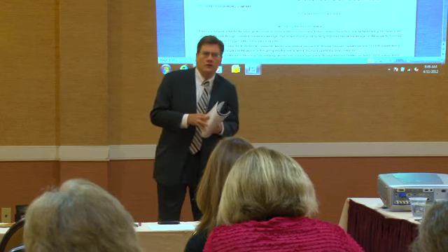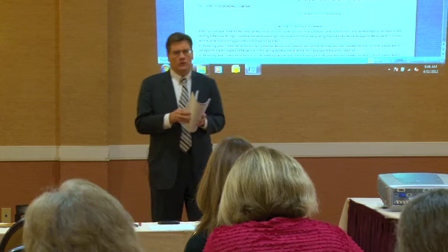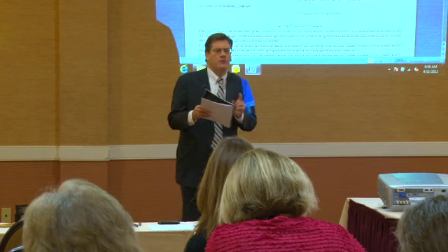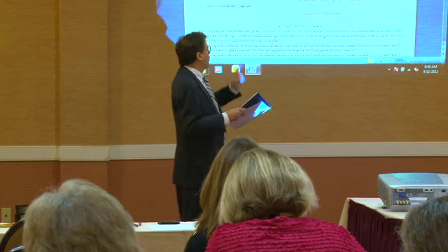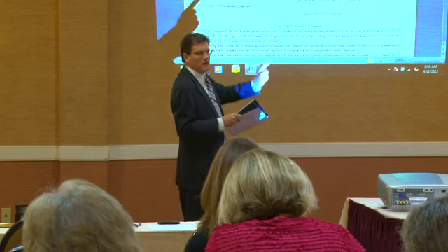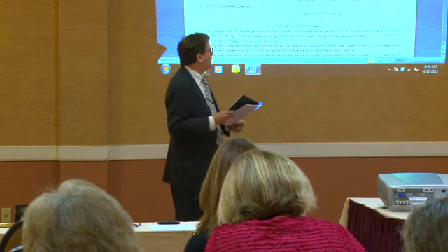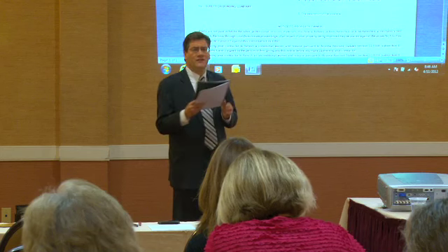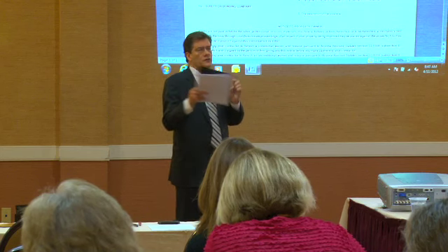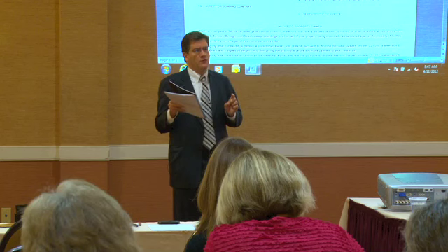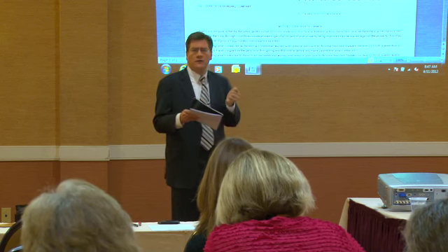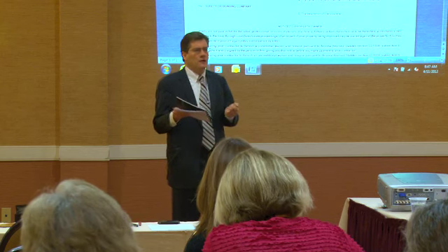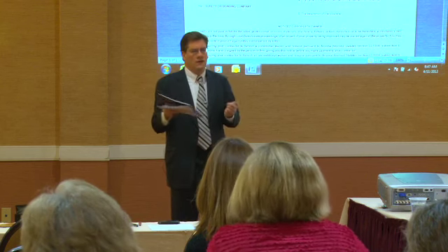The other thing is, in Arizona, we have a 120% rule. Now, that 120% rule says that you have the opportunity to record a lien claim for 120% of the stated value on your preliminary notice. So if you put $50,000 there, and then it turns out that you supplied $60,000 in materials to the project and you were not paid for that, you can record a lien claim for $60,000 because, a little simple math, $60,000 is 120% of $50,000.